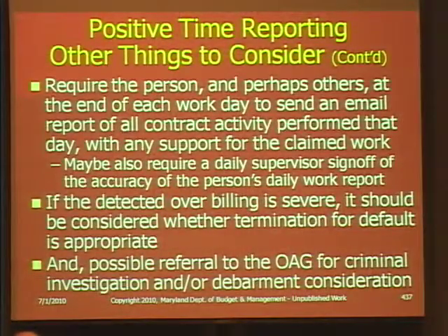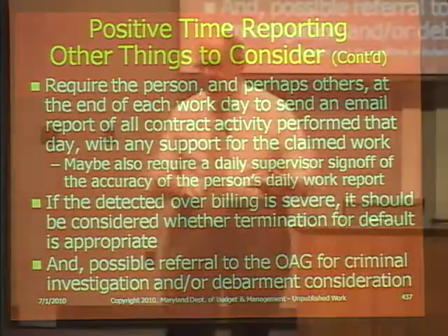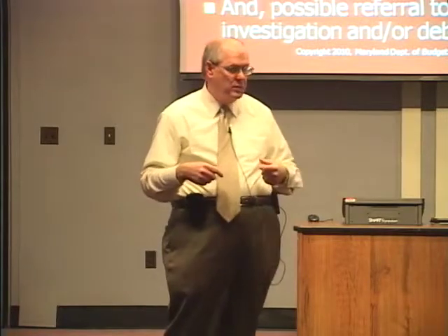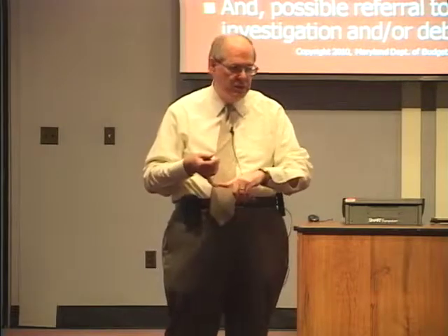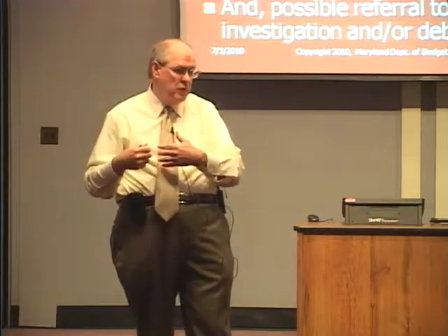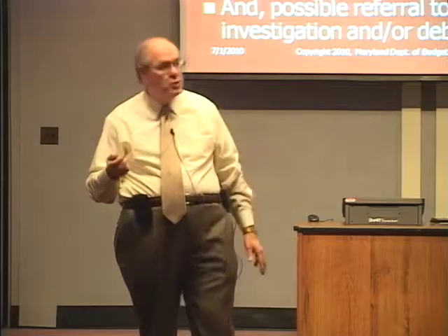We could require the person and perhaps others at the end of each workday. This is really getting extreme. But if you, the vendor, say you have 3 people working on my contract, instead of waiting to the end of the month to get some kind of documentation about the hours that those people worked on my contract, you could have them each day at the end of the day, in the last 5 or 10 minutes, send an email to the state contract manager saying, today, here's the hours I spent on your contract, here's what I did. So that this is being aggregated on a day-to-day basis, not just internally within the vendor, but with the state agency as well. Now, obviously, it's more work for the state contract manager, but in this instance, if you have documented some improper billing, it might be the prudent thing to do.